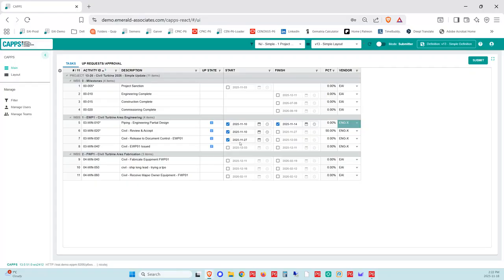we've got different things we have to update depending on the activity. You can see that these first ones only have a start or a finish. Those are milestones. That's why they're looking like that. These activities could be task, resource dependent. They could be level of efforts. They could be WBS summaries. So it depends on what you chose in your filters and your setup. Okay, so they can be all those other activity types. So we can expose all the activity types.